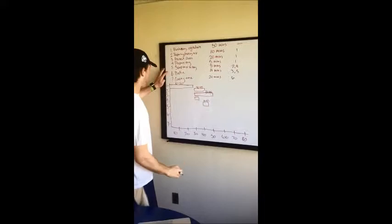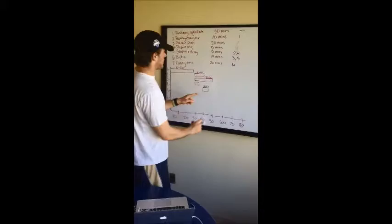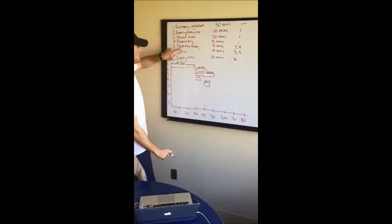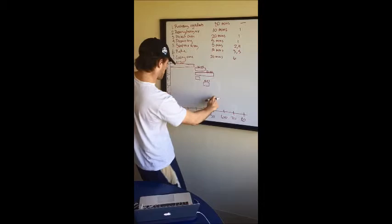So now we have our sixth step. And that is to actually bake the brownies. So in order for us to start step six, we have to wait until three and five is done, which is preheating the oven and scooping the mix into the tray. And so if three ends at 50, six will start at 50. And it takes 10 minutes. So it will end at 60.